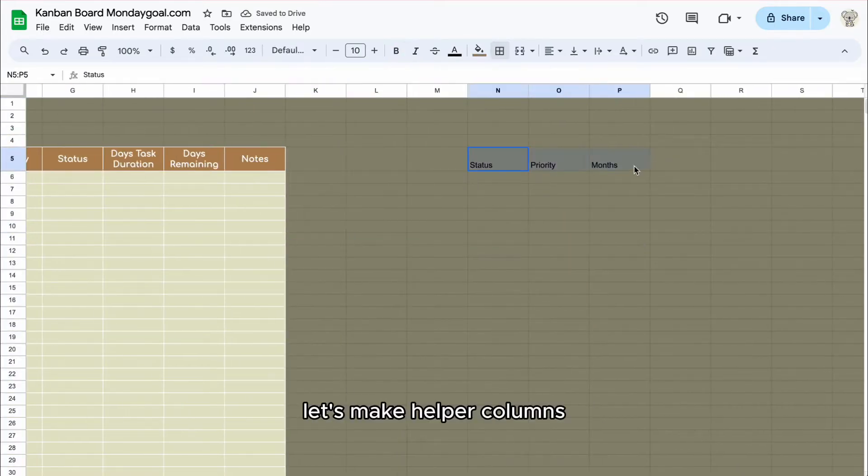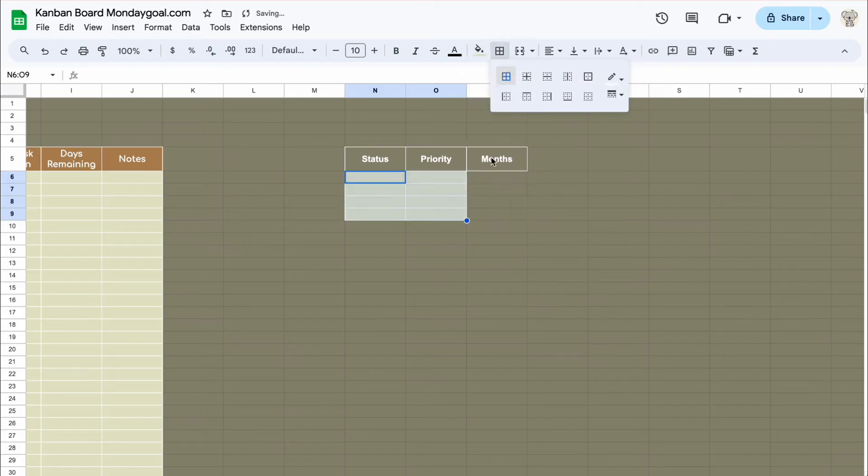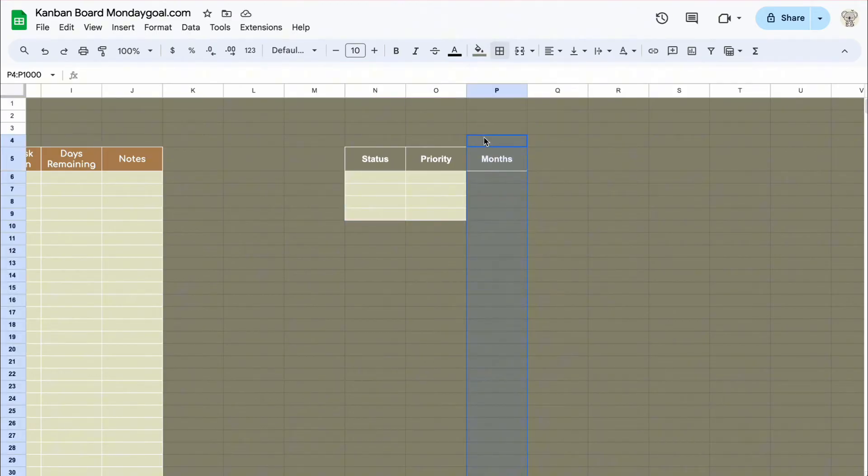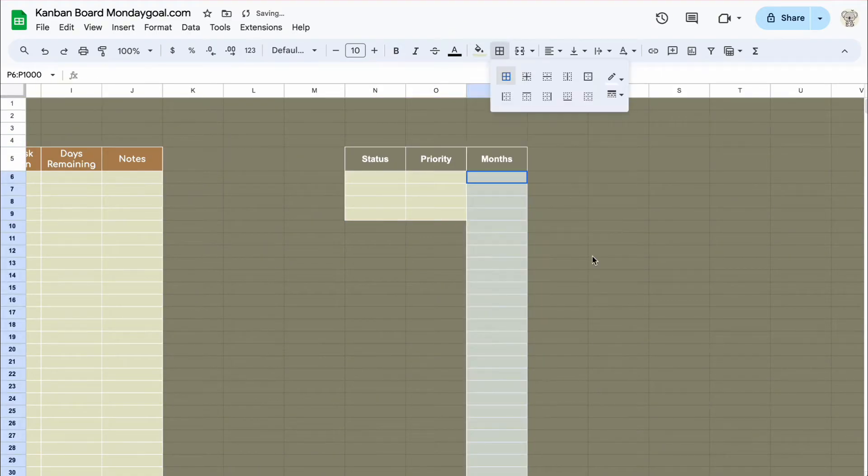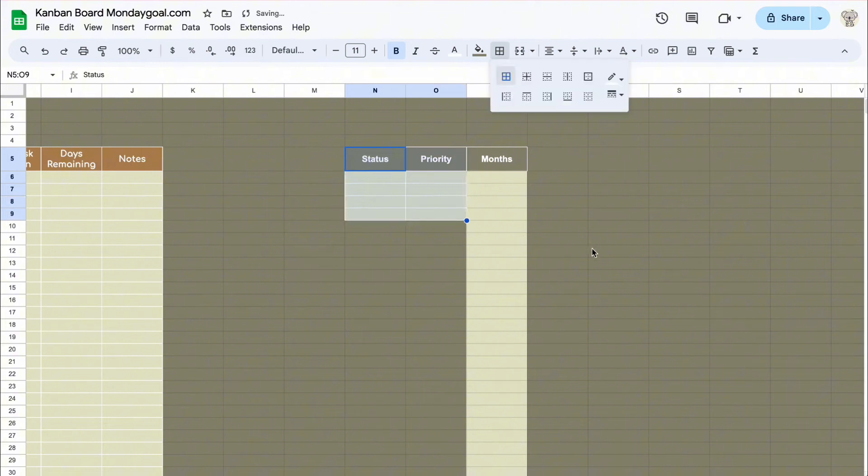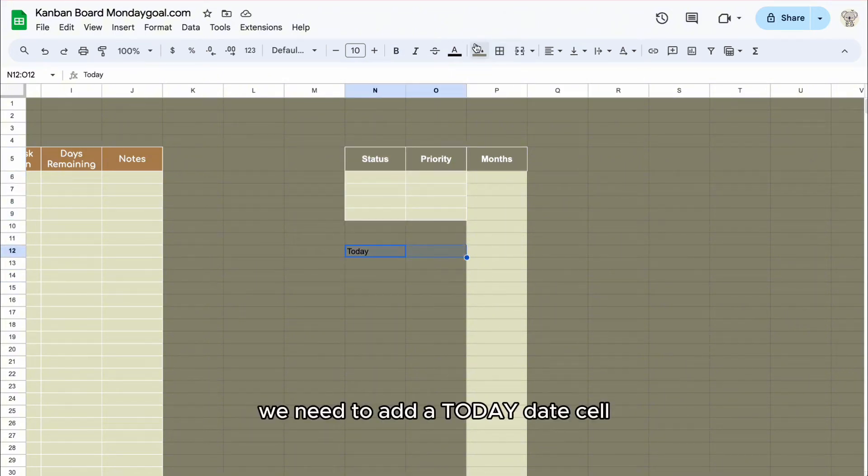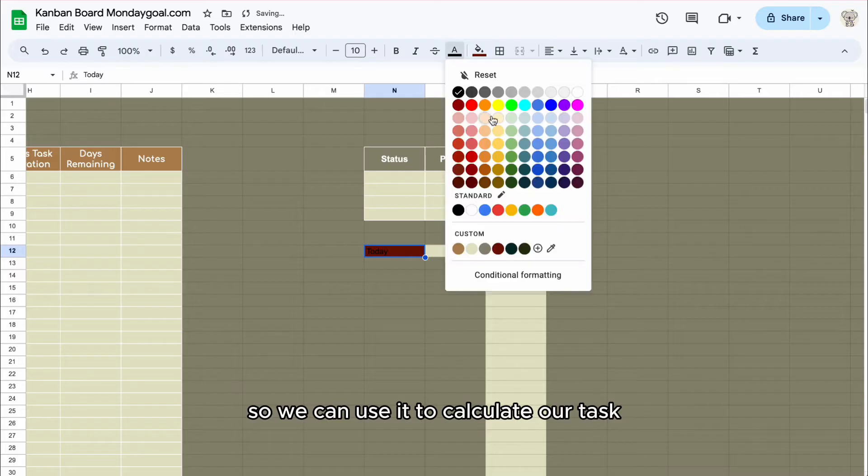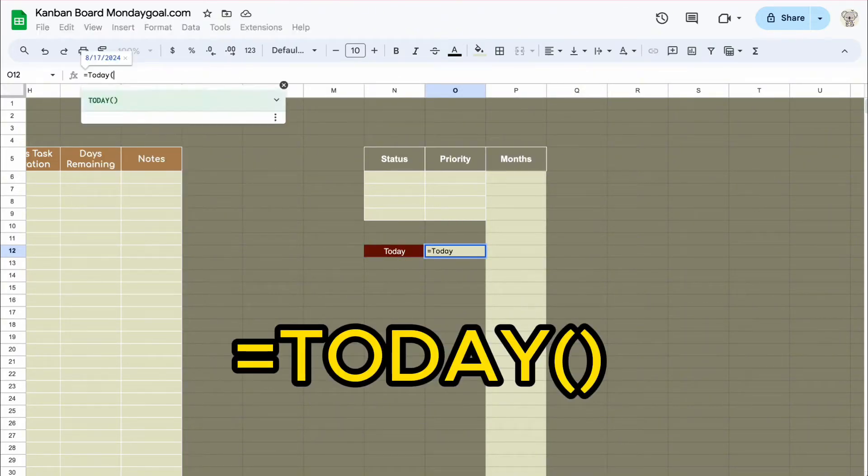Let's make helper columns. We need to add a today date cell so we can use it to calculate our task remaining days later.